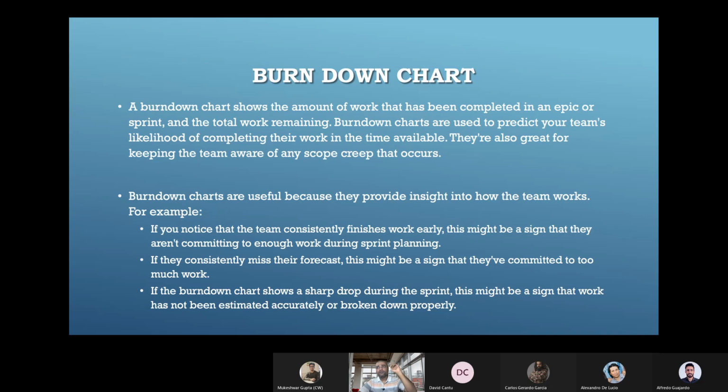So what we'll do, if these two stories are completed, so their weight, the 2 and 3 and 5, so 10 story points get completed, and the targeted story point was 45. So you will see that graph coming down. I will be showing you in the next slide how that graph will be. So ultimately from the burn down chart, you are going to know exactly how much work is completed and how much is pending. So it is giving you clear visibility.